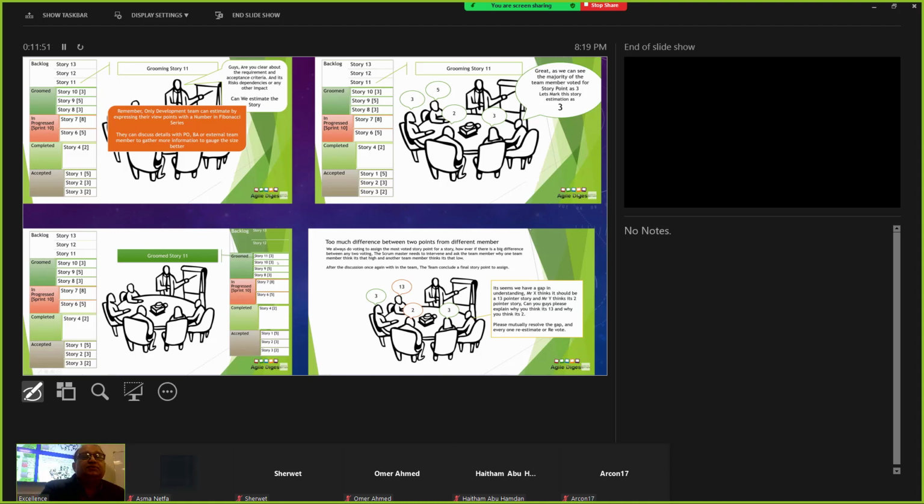All right. So you are here, right? Yeah, I'm here. So everybody will vote, and then we'll see. Let's say there are a total of 5 people and 3 of you say give 3 story points to that story, so we'll select that most probably.